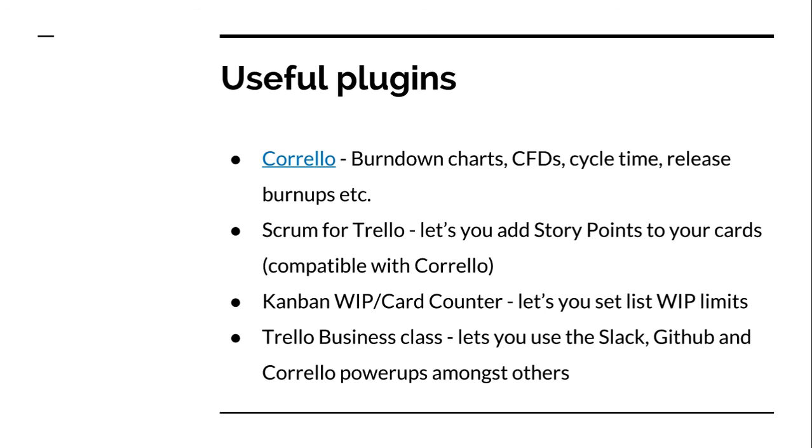There's Scrum for Trello, which lets you add story points to your cards. That's compatible with Corello. The way Scrum for Trello does it is it just puts numbers in brackets in the title. So if you put numbers in brackets in the title, Corello can pick that up as story points, but Scrum for Trello gives you a nice little UI for doing that, with your Fibonacci sequence of numbers to click on.